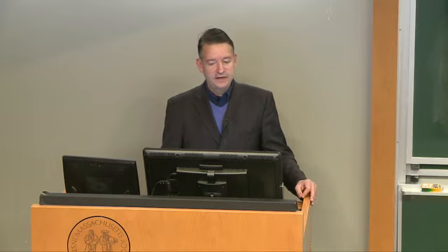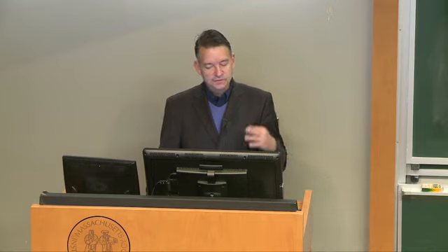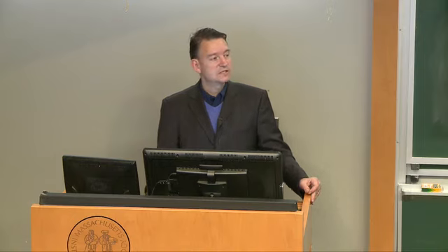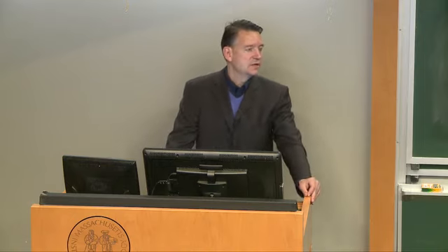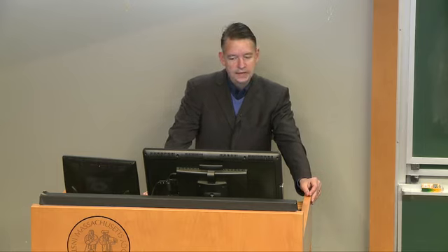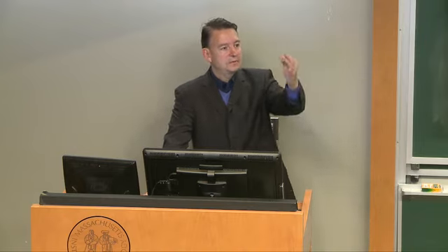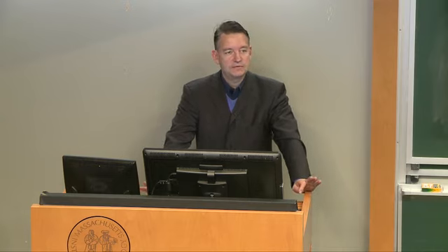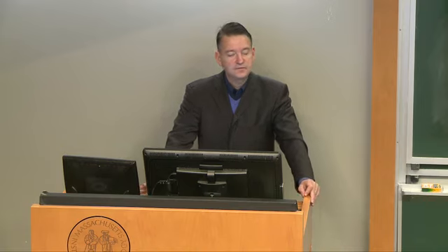Now, what are the types of verification? So test we'll talk about, so you're physically testing, but there are other ways to do it: through analysis, through demonstration, and through inspection. So analysis essentially means you're doing a mathematical calculation or a simulation that satisfies you that this requirement is met. And you're doing this with the input parameters into the simulation being as accurate as possible based on the physical reality of the system you have. But for whatever reason, either because you don't have the funds for it or you can't simulate the operating conditions well enough, you have to do it through analysis.